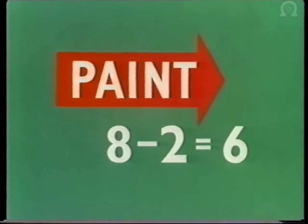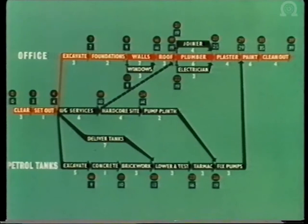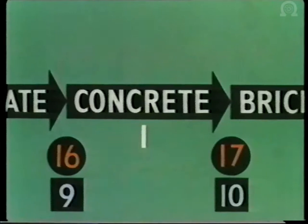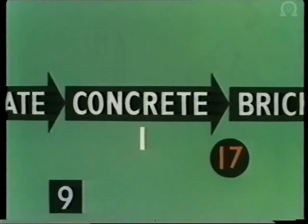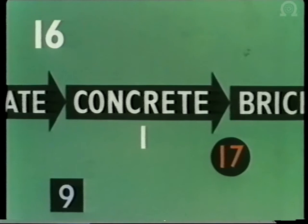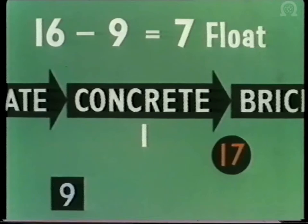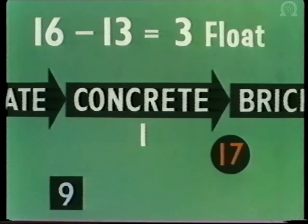Now the CP diagram for the job is complete. Any operation not on the critical path has spare time for its completion. This spare time, or float, is important. Take concreting the petrol tanks, for example: the job must be finished by day 17, its duration is 1, so its latest time for starting is day 16. But the earliest starting time is day 9, so there are 7 days spare time, or float, for this operation, assuming it starts at the earliest possible time. If it starts later, some of this spare time would have been used up on previous jobs. If it is delayed until the last possible moment, all the float will have been used up, which could have been available for later jobs in the sequence.